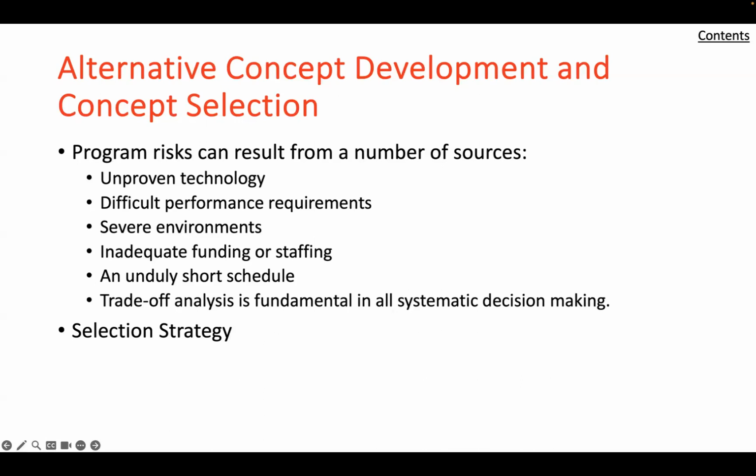In the event of conspicuous imbalance in the above, attempt to modify further the concept to achieve an acceptable balance for all requirements. Five, assign weight factors or priorities to the evaluation criteria, including cost, risk, and schedule, and apply to the ranking of each concept. Avoid concepts that do not have a sound balance of the above factors. Six, for each evaluation criterion, rank order the several candidate concepts. Seven, look for and eliminate clear losers.